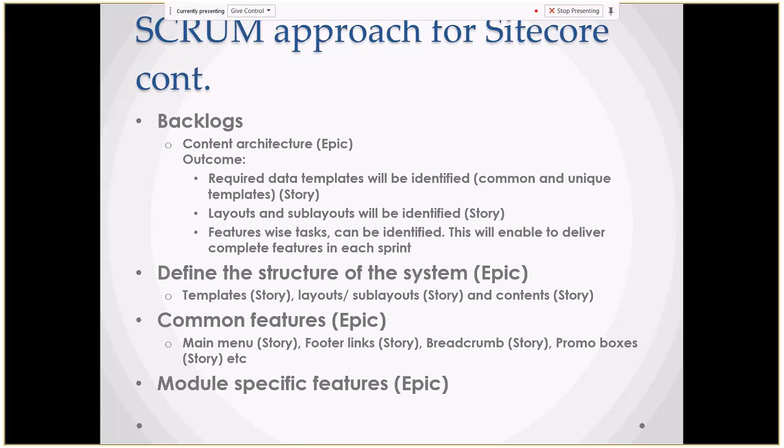An epic is a high-level requirement. It doesn't need to be delivered within the sprint itself. You can have an epic for maybe 2 or 3 iterations. But a story needs to be delivered within the sprint itself. Most probably, you can consider 2 or 3 days of effort for a story. Which means when we are breaking down the task, you need to break it down as small as possible, so that it's easy to track, easy to test, and easy to do the estimation.